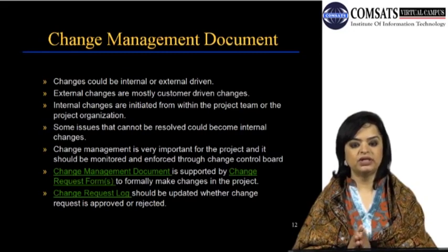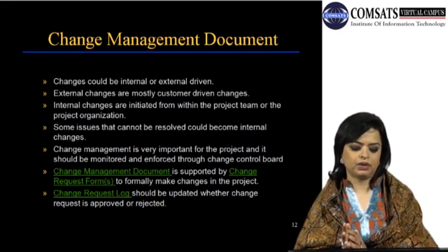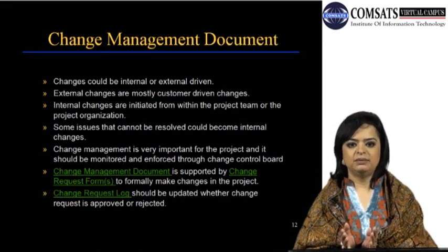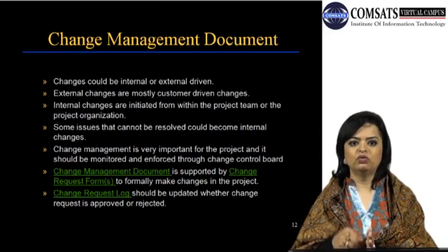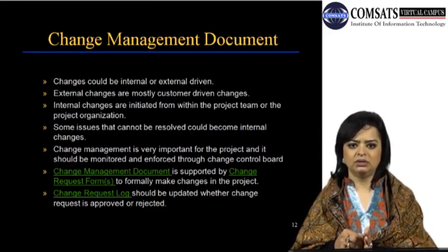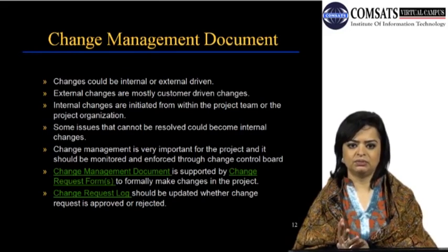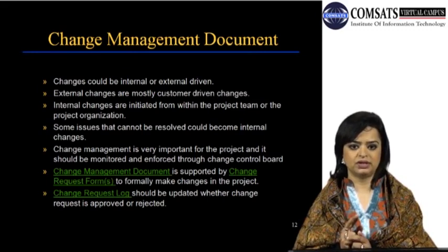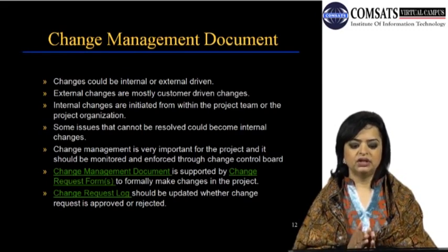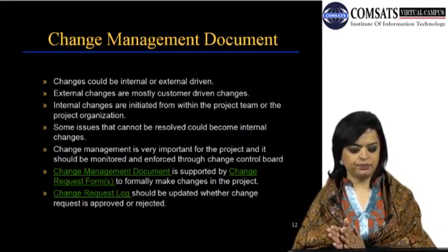External changes are mostly customer driven changes. Most of the time, external changes are welcomed by the project team members because they are seen as an enhancement to the project, or if it's not a fixed price project, more money and more work for the project organization, and are considered beneficial. However, if it's a fixed price project, then things are not going to stay the same. They are always seen as negative.